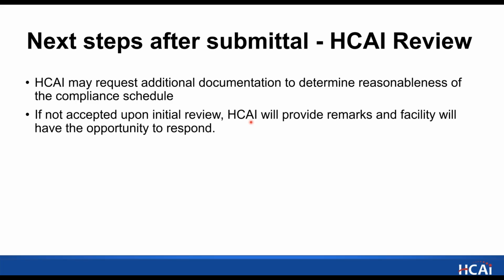So for example, if you put a 10-story new tower and it's gonna get started and finished in two months, obviously that's not a reasonable timing. So if we see something that is not reasonable, we'll pick up the phone and talk to the facilities directly and hear them out. But there's some reasonableness review in the compliance plans. So we will put everything in writing as well, and the facility will always have an opportunity to respond.